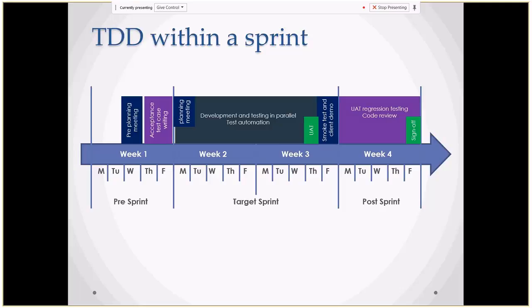Well, this is the normal workflow that we work on. But if there's an urgency and if we find a critical defect in production, we can't wait until this timeline follows. So then we'll have emergency deployments and emergency code fixes. Once those code fixes are done, those are treated as special cases. So we don't have to wait until the 9th day to do the UAT deployment for that. We will be getting the approval. In those kinds of scenarios, we need to get the approval from management.